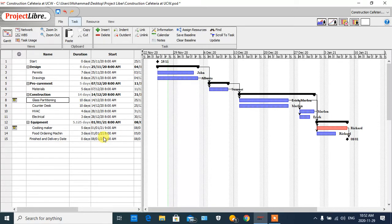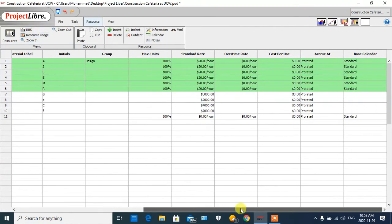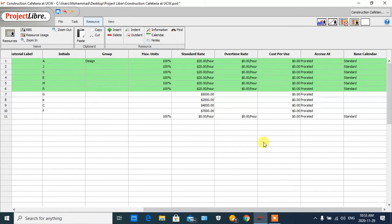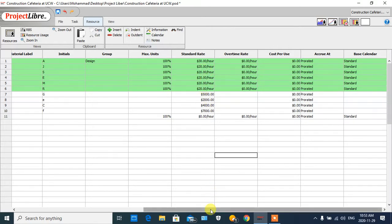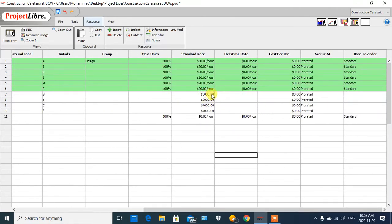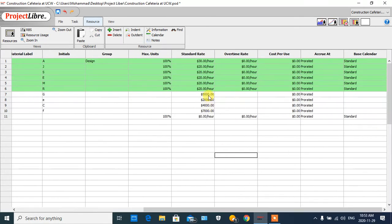The second feature is cost. For the cost, I come back to the resource spreadsheet. As you can see, we have the 'Standard Rate' column. For each person I put $20 per hour, or maybe I can change it to $30 per hour. For the material, I estimated that for the glass we require $5,000, and for the electrical equipment and other materials we can put our estimates here.